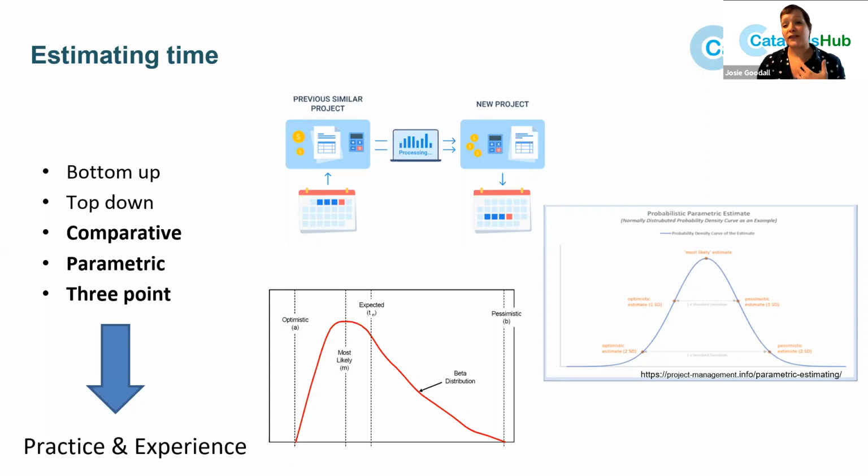And with the 3-point estimate, you can use sort of a critical path analysis, or what some people call PERT, which is Program Evaluation and Review Technique, which comes from the US Navy, which is designed to create critical paths and then look at a pessimistic, optimistic, and most likely evaluation for each task and give you the minimum time for the project based on that critical path analysis.